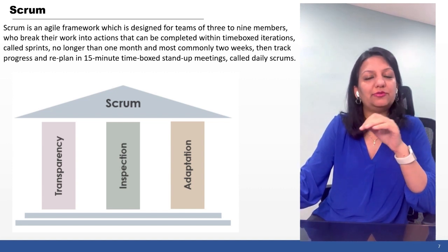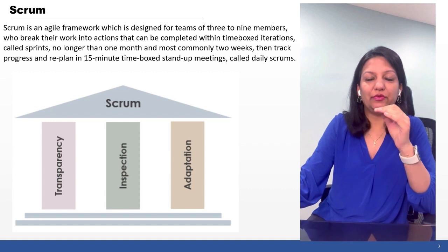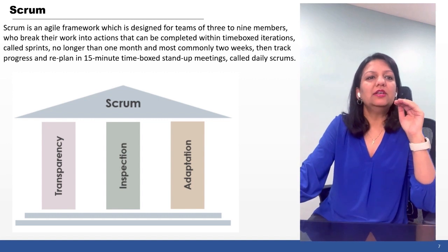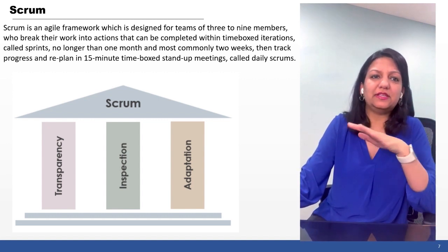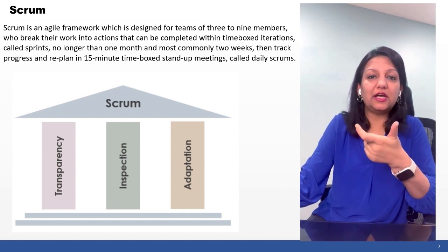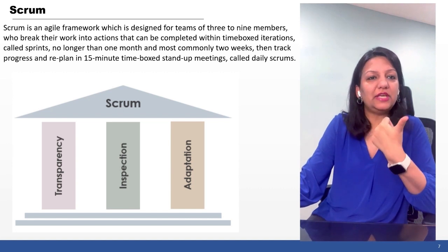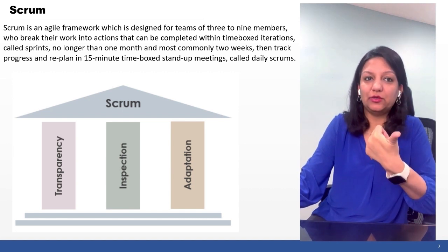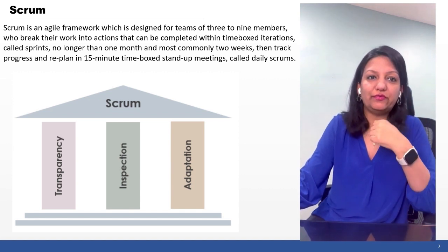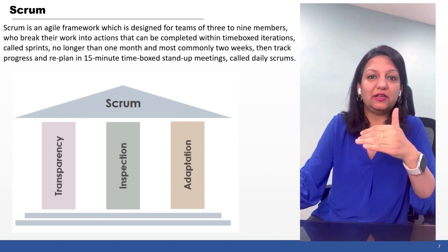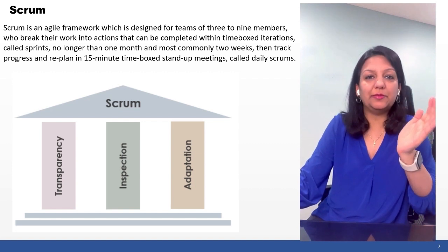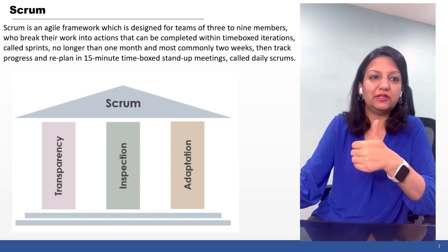So for those who have not experienced Scrum, I would like to repeat for them to be able to visualize how Scrum works in reality. Try to visualize 8 people sitting next to each other, working together for a common goal for the upcoming 2 to 3 weeks. On day 1 of the sprint, the team decides and plans the work. For the next 2-3 weeks, they meet every day for 15 minutes to track the progress, which happens on a daily basis. And then on the last day of the sprint, they demo the outcome to the product owner and business owner.